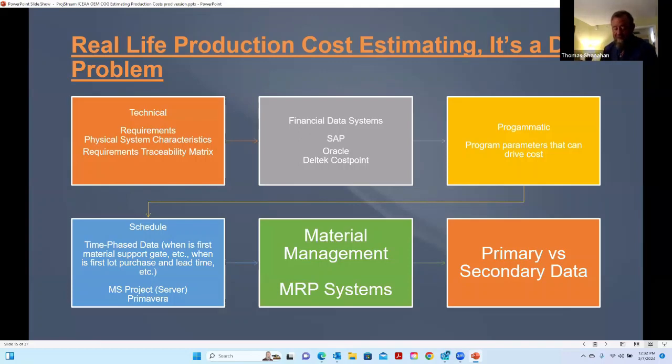So these proposal data pieces are stored in a variety of different areas, sometimes with limited access. This makes it difficult to harvest that data from prior efforts and reuse it. Sometimes data has to be mapped from bill of material structures from one system to the other, and then you're mapping it to the WBS, and a lot of that is manual. So that creates somewhat of a problem. Running the data from history is quick sometimes, but the mapping and connecting it all together from these disparate systems seems to be one of the major problems.